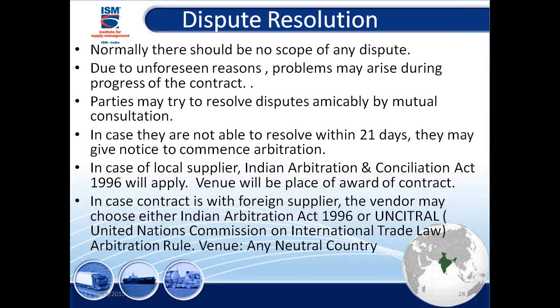Now who got the benefits? You know better than me. So keep in mind, we always start with a good base, but sometimes something goes beyond us. Could be for many reasons. I don't want to get into discussion on those. But due to unforeseen reasons, problems of all natures may arise during the progress of the contract. Parties may try to resolve the disputes amicably by mutual consultations. If it doesn't happen within 21 days, you have to give a notice to commence arbitration.